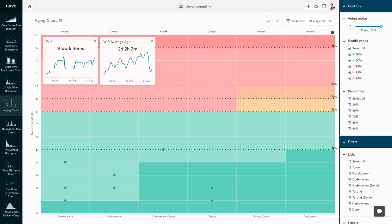According to Little's Law, maintaining a stable system depends on two main factors: your work in progress and your average age of work in progress. For these two metrics, the key is consistency. Stable systems are determined by keeping both WIP and the average age of WIP consistent, and the more stable your delivery workflow is, the more predictable it becomes. The average age of WIP and cycle time are essentially the same metric — cycle time is measured against completed tasks, whereas the age of a task concerns tasks still in progress. If the average age of your WIP stays roughly equal on a daily basis, its trend line will be linear. If you find that the line is sporadic — at times increasing or decreasing dramatically — this points to an inconsistent average age and bottlenecks in the system that need to be addressed.